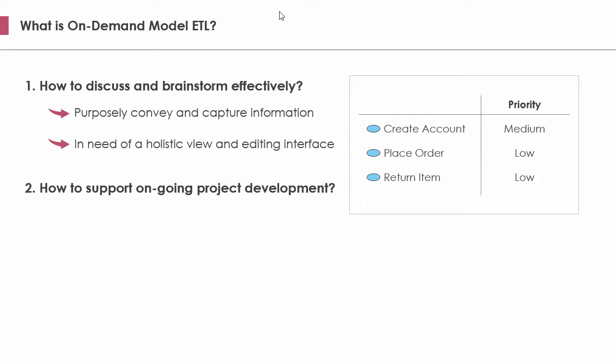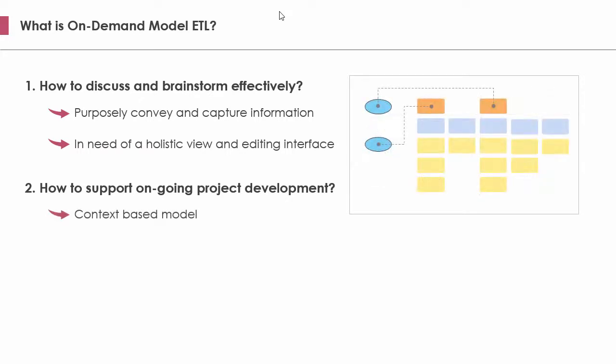An effective model is not a silo, but connected with other models in contributing the ongoing design, analysis, and communication needs throughout the software project. Take the use case model as an example. Once the use cases are prioritized, the scrum product owner can pick out those important ones and present them on a new diagram specialized for release planning. To facilitate ongoing project development, it's important that a model can be transformed and evolved from one form into a new form.